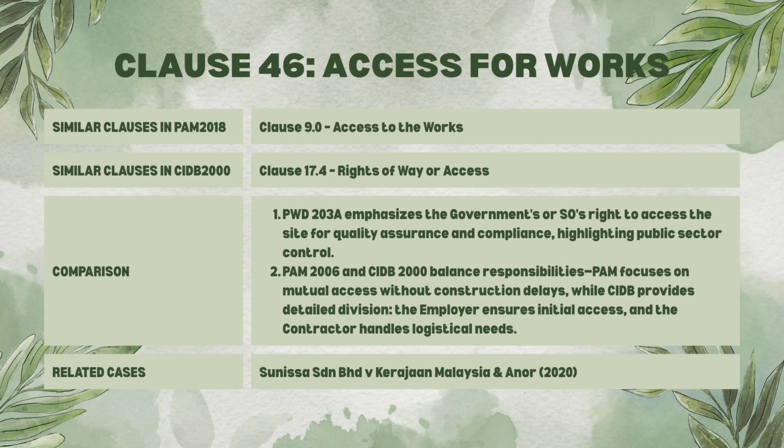The case related to this topic is Sanisa Sdn Bhd versus Kerajaan Malaysia and ANOR. In this 2020 case, the contractor, Sanisa, suffered delays in project completion due to the government's failure to provide timely site access. Sanisa claimed for loss and expense under clause 44.1 of PWD.